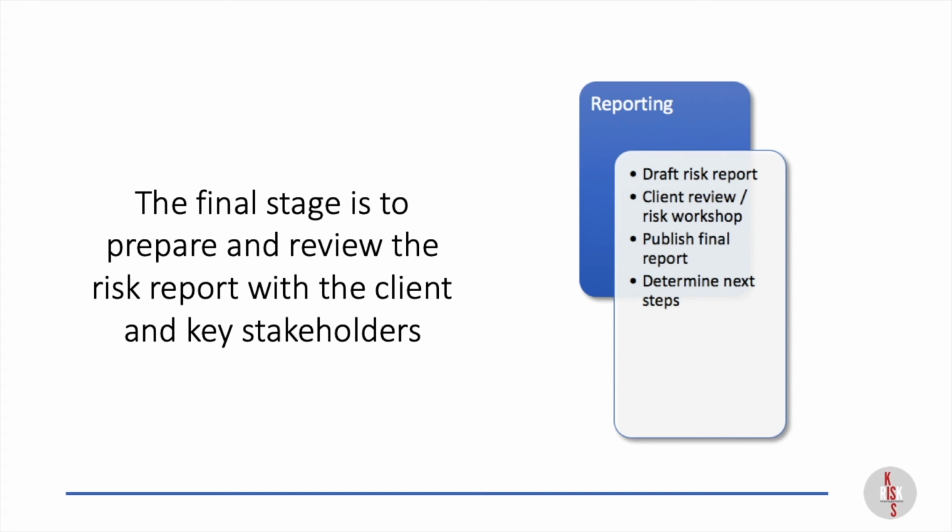Now, you may go back and review it later, but then you create an update to the report. The original report shouldn't change, because that's going to let you determine whether you've been able to address the risks and mitigate them later on. You need to know where you started in order to determine if you've made any progress.